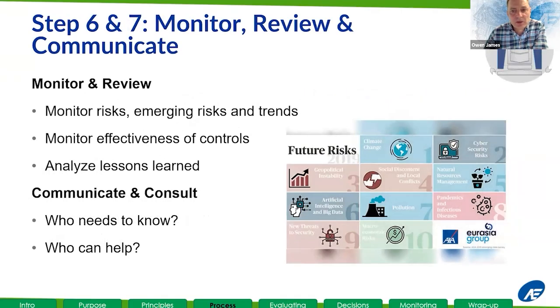Monitor, review, and communicate. This encourages organizations to review and improve the approach to risk management and keep a watch out for new and changing risks. So it's not just about saying, that action that we identified, yes, we've implemented that action, or no, we didn't get the funding for it, it's still a risk. It's also about taking a step back and saying, hey, we get together as a committee once every 5 years. Is that often enough for us to manage our risks? Probably not. Maybe we should get together as a risk committee every year or every quarter.